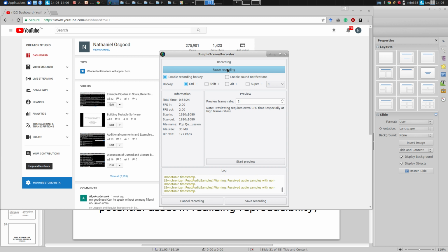Another thing you can do is, this says during meetings, so a little bit of a retreat, but if someone's copying these things down, you can show them to the stakeholder at the end and say, look, this is what we thought we heard. Are we off base with any of this? That's another really good technique to use. It does require someone to be kind of a recorder. Okay? Good.